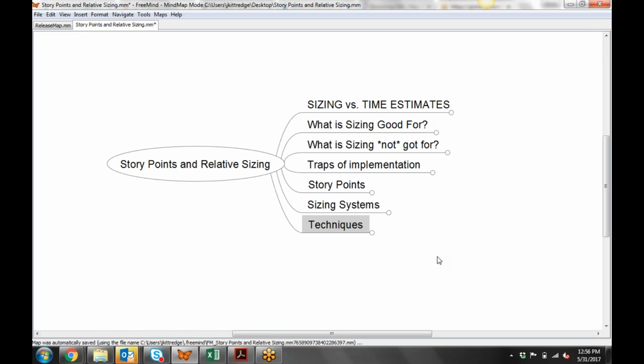I can estimate when I think it's going to be there based off of these techniques, saying, okay, the sizing for this is an 8-point story, an 8-point story, a 5-point story. We're going to have some additional effort because of building and packaging. So overall, that's going to be 28 story points total. I know that our general velocity says if we're focused on that, we can deliver 28 story points in about 3 weeks. We think we can get it to you in about 3 weeks. So on our board, like sustaining engineering, and again, this generalizes to all of engineering, but it works on a much different scale.